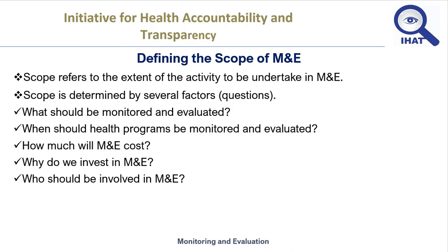How much will it cost? Financial resources will influence the level of evaluation that takes place. It is important to note that usually the cost of MIE is overlooked. It is therefore important right from the beginning to provide adequately and sufficiently for MIE. Program managers must determine whether the time, effort, and cost of an evaluation are justifiable in light of the expected benefits. If you have few resources, your first priority should be to establish a monitoring system.